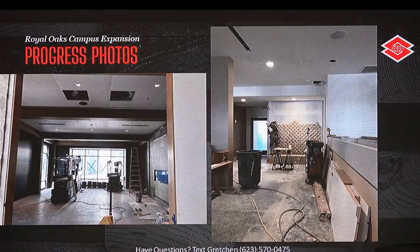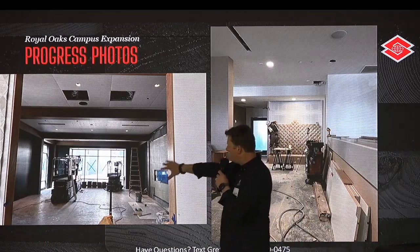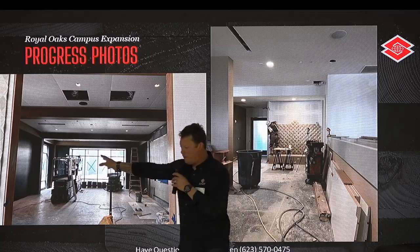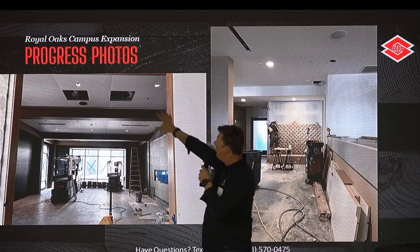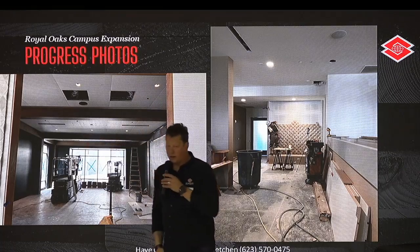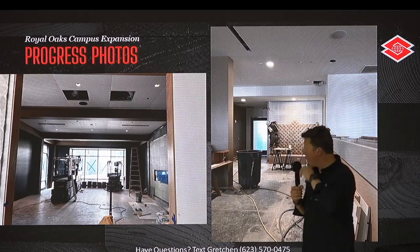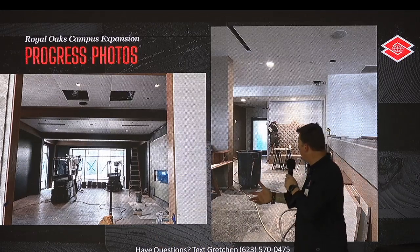All right, so as Sean mentioned, this is the additional dining space. This is the 2-way fireplace. It also reaches out to the breezeway. This view out the windows goes to the courtyard. This is a view looking to the west. Since last month, we've gone ahead and put fabric-wrapped panels in. We've got the lights burning. We've got the architectural millwork that's been fabricated. It took about 3 months to fabricate all those beams and columns. They're out and installed, as you can see.